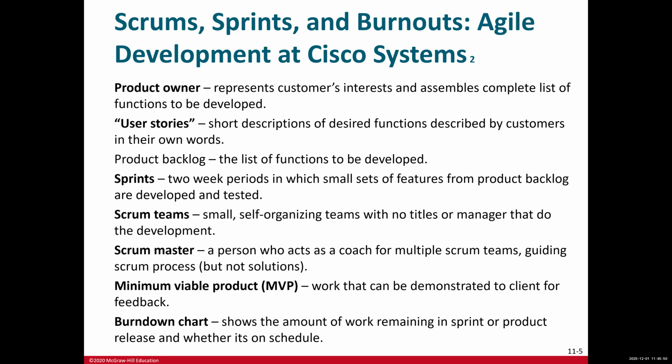What is a sprint? Usually 2-week periods. It's not written in stone. We can change the duration, but usually it is defined as 2-week periods during which a small set of features from the product backlog that we have are developed and tested. At the end of each sprint, there is a demo or review, so we can showcase what we've done during those 2 weeks or 3 weeks, whatever we set for our projects.